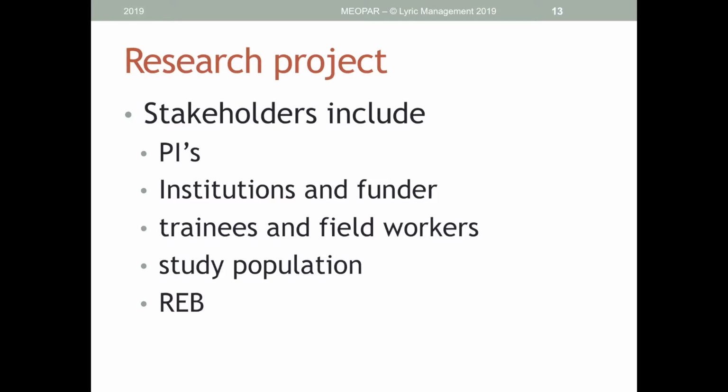The industries: somebody's pointed out that the tourism industry and other industries such as fishing could be impacted by the project outcomes. That's a really good point. Those might be stakeholders. For example, the local fishing community might be an example of a stakeholder group that's potentially impacted by the work that's going to be done, but you don't necessarily know that until you conduct the research. But they probably are an example of a group that would be interested in what the project was going to accomplish. And so engaging them very early in the development and execution of the project could go a long way to ensuring that their role as a stakeholder remains in the interested and secondary category, and that they don't become adversarial and have some kind of influence over the project and the way that it's going to be done.